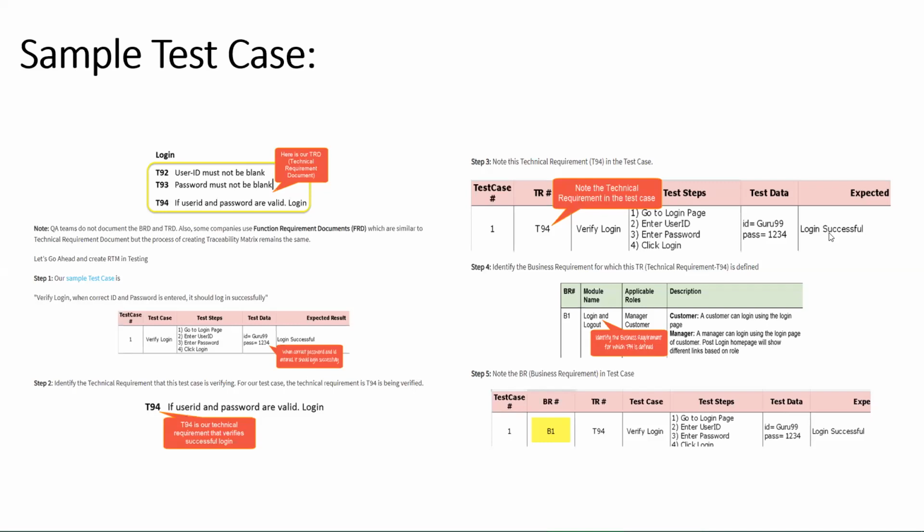So if you are marking it as A, client identification sub process, then you can mark it as A.0.1, since it's a sub process. Any correlated activity, what is the priority of that activity? And then we start with the solutioning. So what is the status of solutioning of that activity? What is the base deadline? What is the due date? What is the actual date?